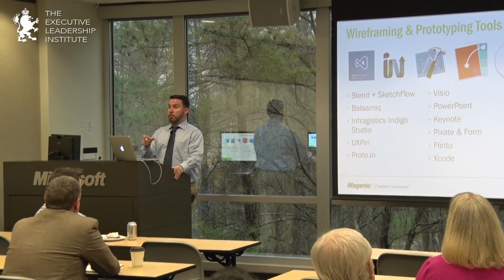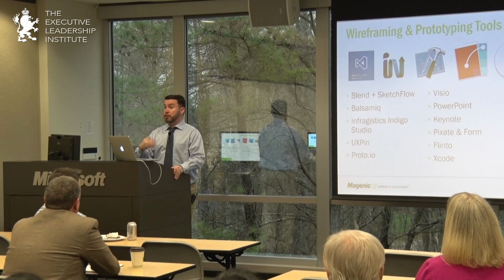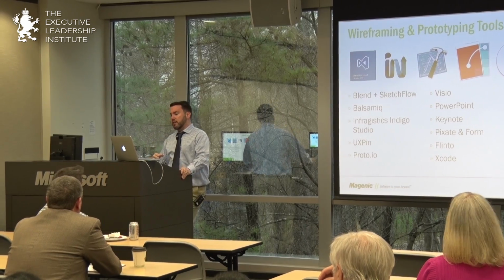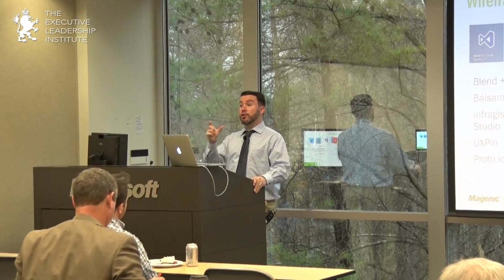So you talked about scope creep within an agile environment. Let's say that you go through and you vet some ideas, you prototype, you even do some development, and then the business comes back to you and says, hey, we want to add an additional feature. That's okay, because what you're doing is basically adding on another sprint, right? There's complete visibility into what this is costing them. In a waterfall situation, they probably said, we're going to give you $500,000 to build this mobile application. And you sign your name on the dotted line and you're stuck to that number.